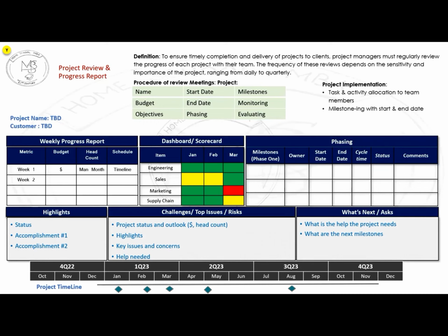So what we mean is that this procedure is carried out on a meeting table. And on that meeting table, there is a secretary of that meeting, not the project manager himself. The secretary is the one who records the meetings, and while recording the meeting minutes, he or she records the problems faced by various teams, the achievements of various teams, suggestions by various teams, and solutions of various problems.